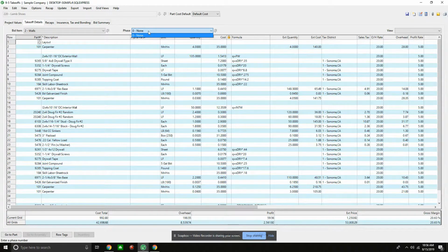Say, for instance, I'm billing three apartment buildings, and overall it's only one owner. I necessarily might not want to set up one job for this big, large project. I might want to set up the project itself, and then put up three phases, basically a mini job inside of a larger job. That way I can truly track my costs from building A, building B, building C.